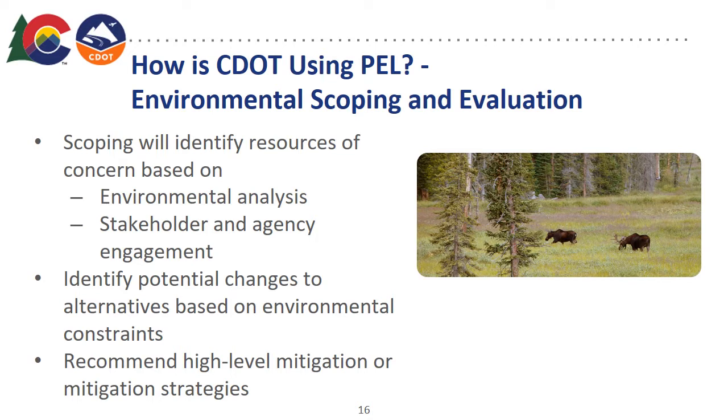The PEL study should identify key resources and resources with lengthy environmental clearance processes that may be affected. The FHWA PEL questionnaire, in particular questions 9 and 10 on that questionnaire, provide guidance on identifying environmental resources in the PEL. PELs will provide context to the environmental resources, often through an environmental overview, similar to the affected environment in a NEPA document, but a much lower level of detail.